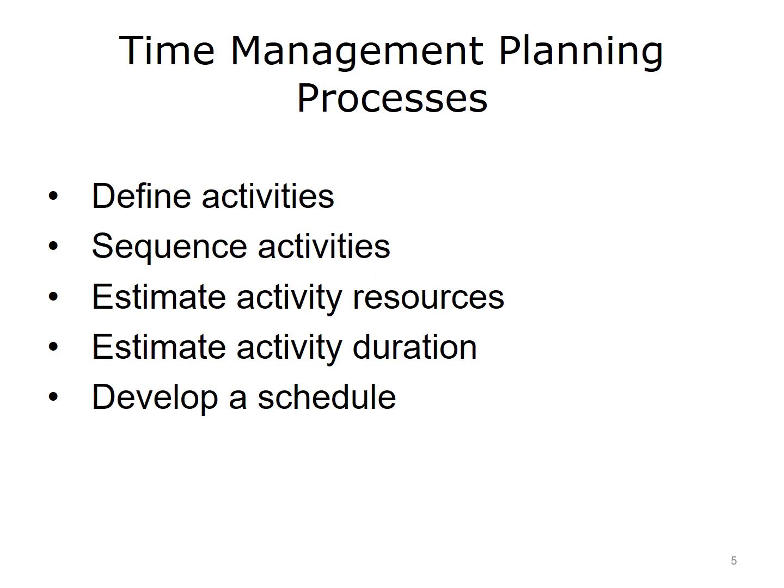In developing the project schedule, the project team determines what work must be performed, who will be assigned the work, the sequence the work will follow, when it will be performed, and the duration of the work. The WBS should not be confused with a schedule. It does not show activity relationships, sequence of activities, or activity dependencies.